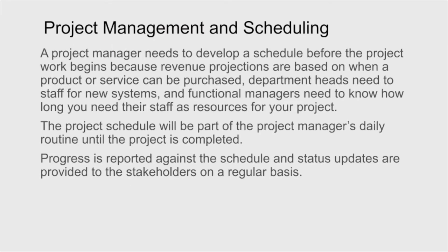A project needs to develop a schedule before the project work begins because revenue projections are based on when the project is in place or when the service can be purchased. Department heads need the staff for new systems. You've got to have a staff when the project is ready to roll. And functional managers need to know how long they need their staff as resources for your project. So if you're building a house, how long do you need the carpenters for? The project schedule will be part of a project manager's daily routine while the project is being constructed.